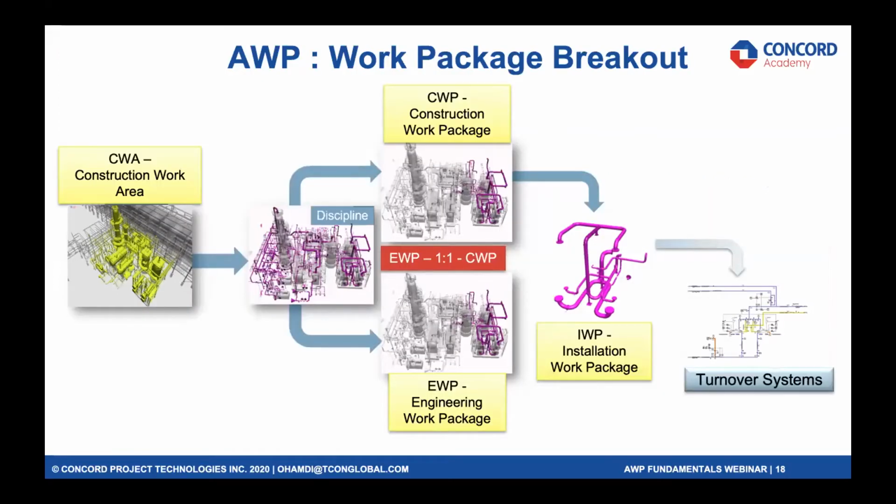So as a summary of this breakout of areas and then disciplines, we have a construction work package that corresponds to an engineering work package, and an engineering work package that feeds the construction work package.